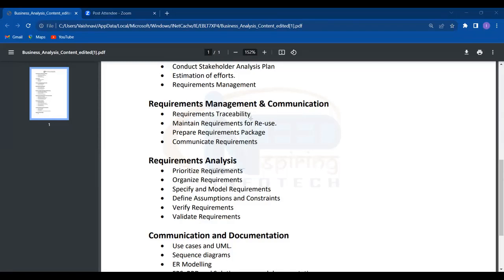We need to trace each and every requirement of the client with the help of certain tools like an Excel sheet. Each requirement needs to be traced or placed at the time of the draft. After preparing a draft, each requirement needs to be properly framed, and a list of requirements needs to be prepared, and the designer should work only on that requirement, and should not move to another objective.